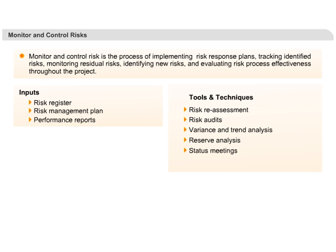Reserve analysis is also done throughout the risk monitoring and control process to check if newly identified risks require additional reserves to handle any eventuality. The outputs of this process include an updated risk list — for example, risks that are no longer applicable will be removed from the risk register.